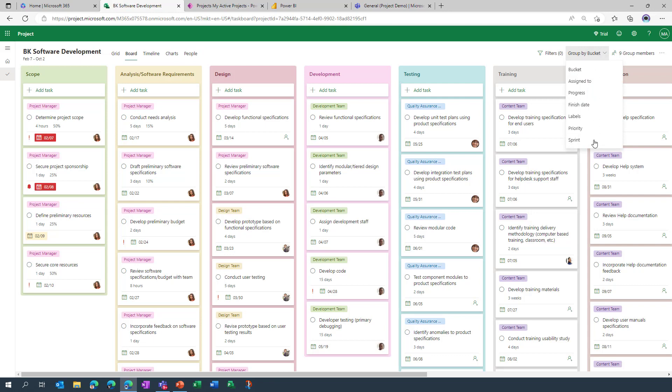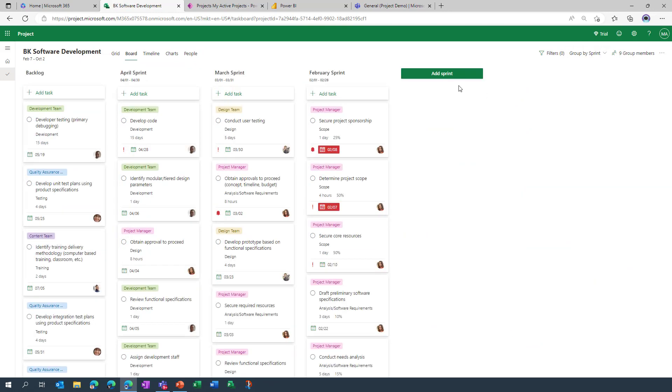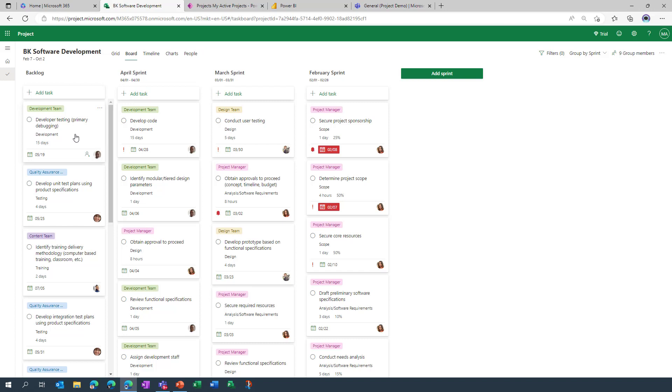Now I'm going to switch over to a different view and the view that I'm going to go to is the sprint view, which is the latest feature that Microsoft have added. It's a very simple premise: we've got a backlog and as a default when you first go to the sprint view and you've not created any sprints yourselves, all you see is the backlog and it's then up to you to go in and add the sprints.